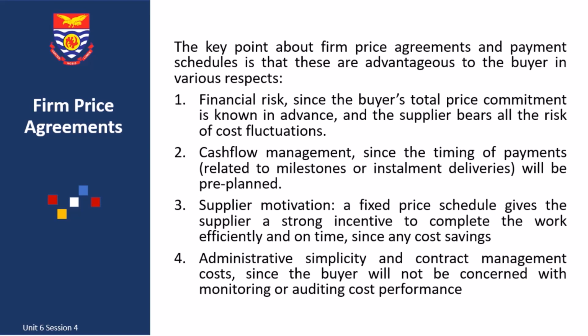Another advantage is supplier motivation, where a fixed price schedule gives the supplier a strong incentive to complete the work efficiently and on time, since any cost savings below the agreed price are kept by the supplier, and it is also liable for any cost blowout.